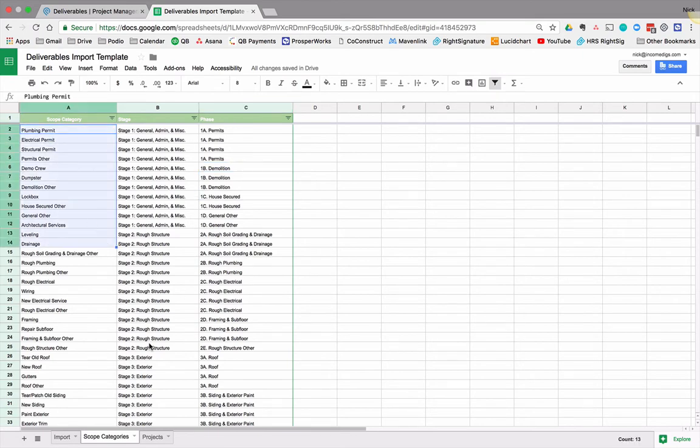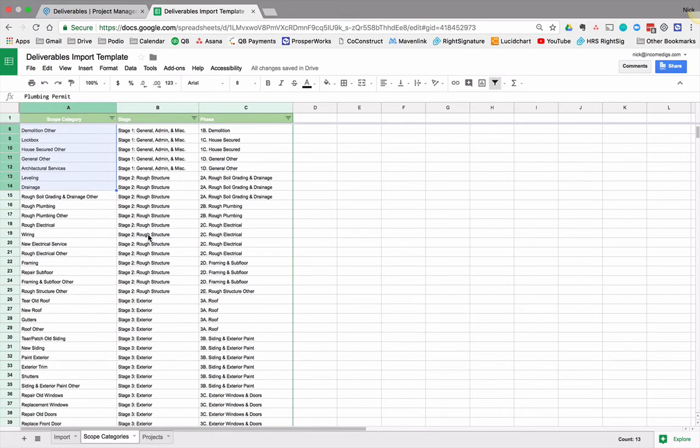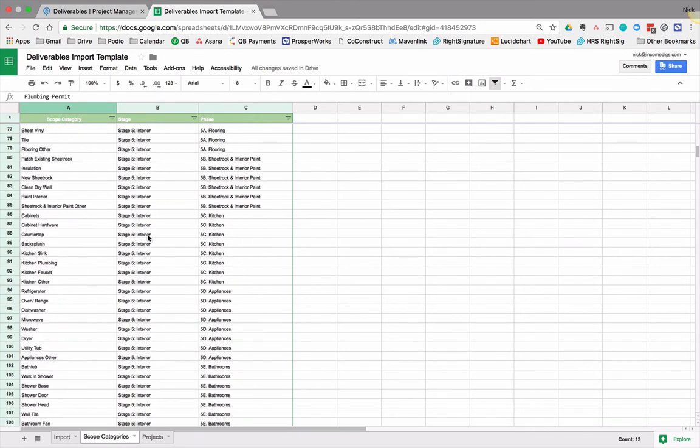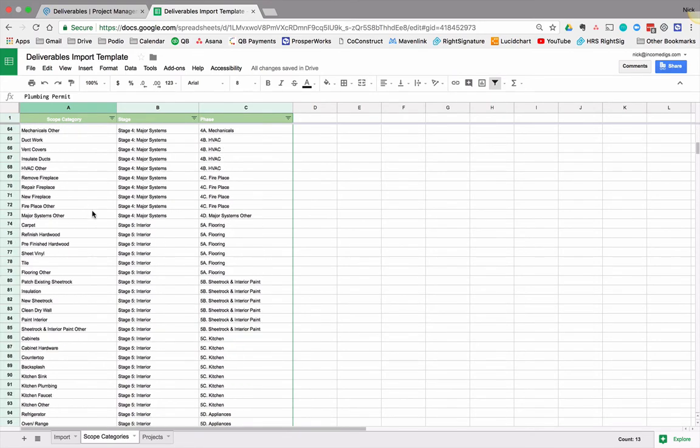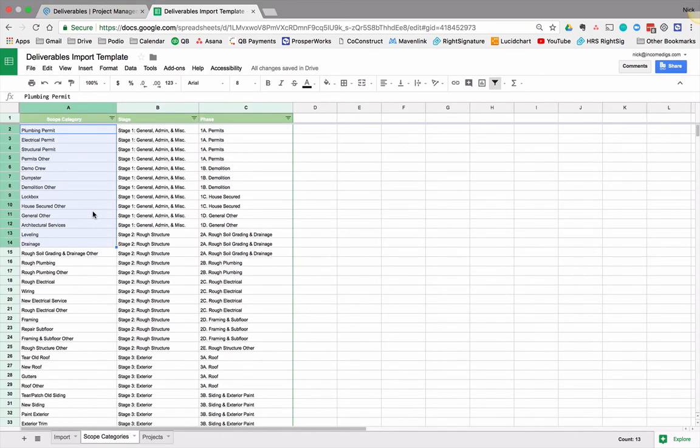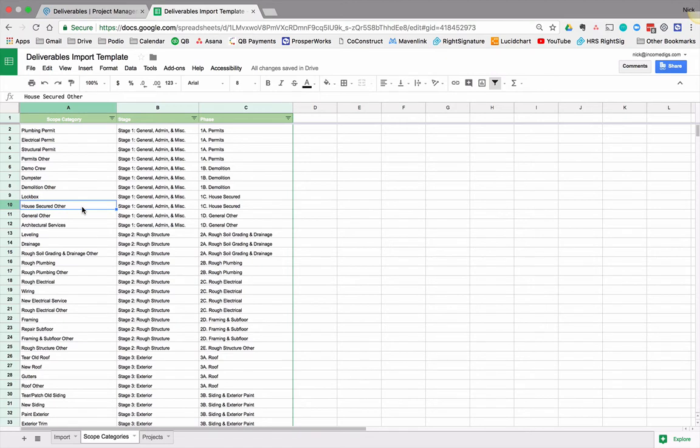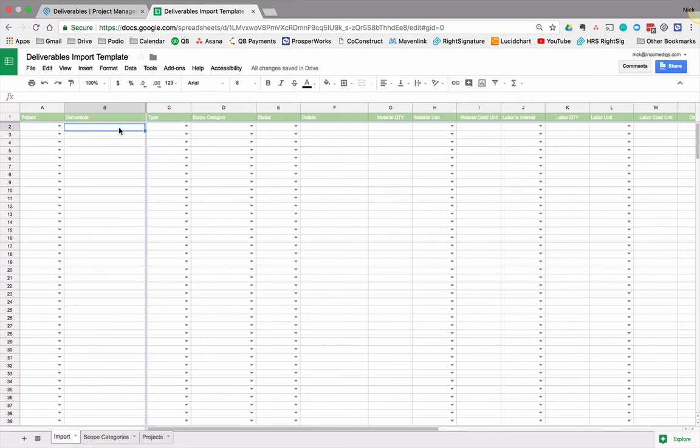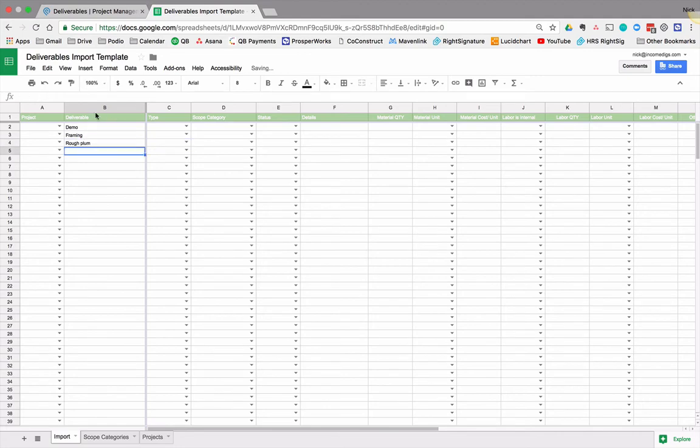Stage one, then one A, one B, one C, and then within that are all these scope categories. And these go in order, stage one through six of how we would do a project. And now in a typical project, you're not going to use all of these, that'd be rare. But what's a good idea is to assume you are, put them in your scope template and force your project manager or yourself to think about all of them and to consciously say, we don't need to use this budget.